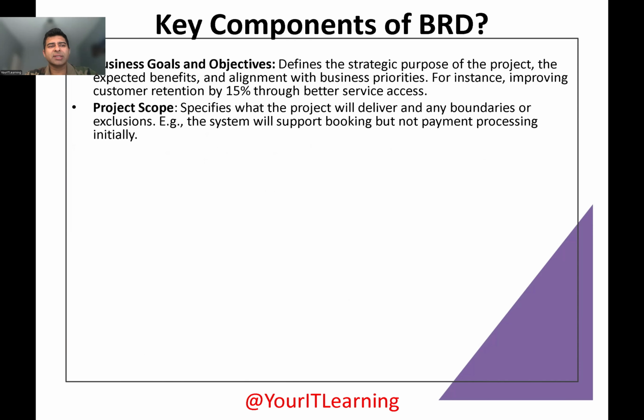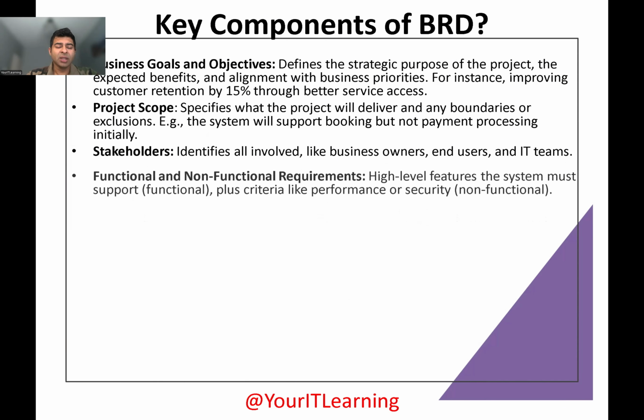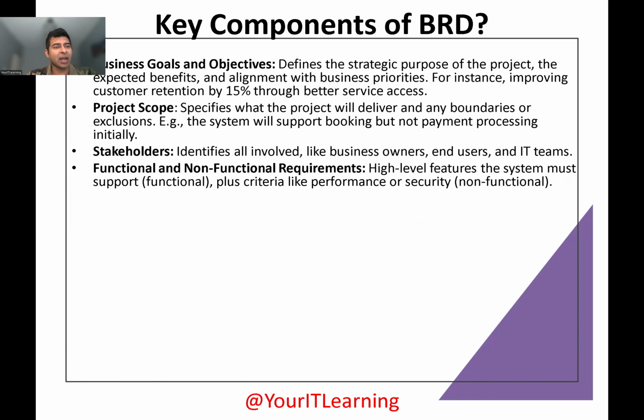So think about the project being in the initial stage, and we are only focusing on supporting booking but not the payment processing right now. It will also outline the stakeholders, so in case a business analyst has a question or any query, they know who they can reach out to. The BRD identifies all involved, like business owner, end user, and IT team. So if anyone is reading this document, they can see who the main stakeholders for this project are.